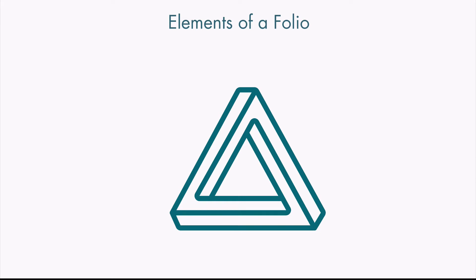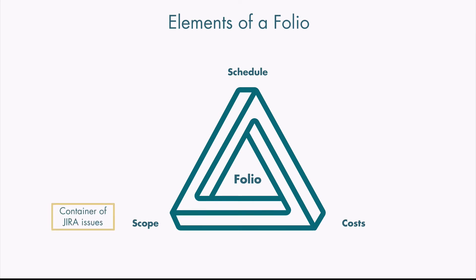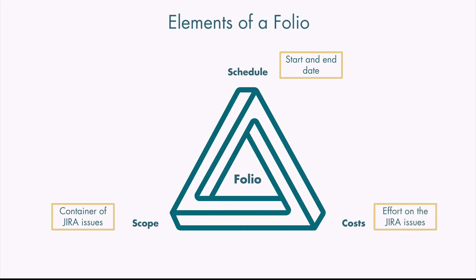The fundamentals of Tempo Budgets are folios. A folio in Tempo Budgets consists of three main parts: the schedule, the scope, and the costs of a folio. The scope of a folio is always a container of Jira issues, and these Jira issues can be defined by a Jira filter. Tempo Budgets will always create a Jira filter behind the scenes for you.